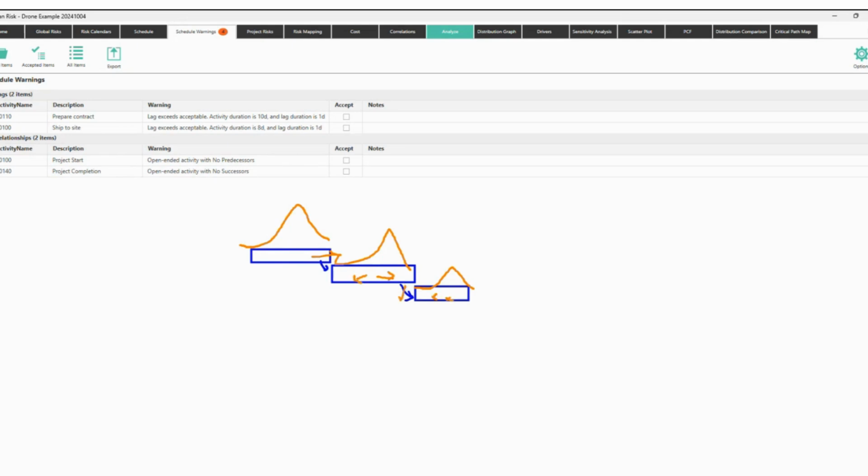But if they are not linked, let's say we don't have a link there, all this extension and stretching that we had with the previous tasks is going to be disrupted here. You're going to have a disruption, meaning that the risk is not going to be propagated. It should be cascading. And if it's not cascading, meaning that the main milestones or your focus activities are not going to receive that risk.